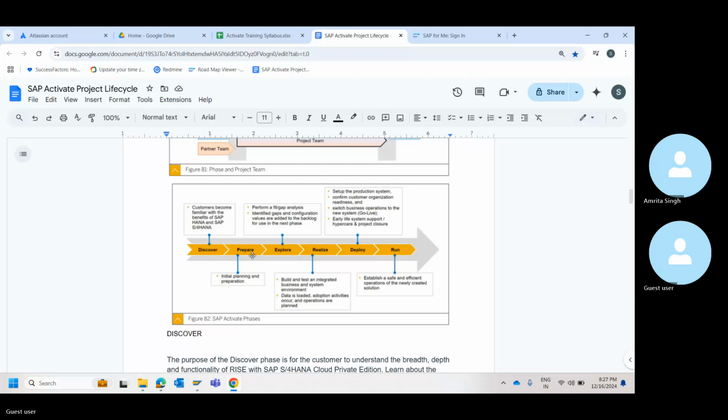This is one. Then you will prepare a project charter. You are aware of project charter, right? Yes, I am. Okay. So we will prepare a project charter, and we will have something called a scope statement. What's the scope? What do we do? We will further explain in detail about the scope statement and get it signed off. And then we will also have a stakeholders matrix.